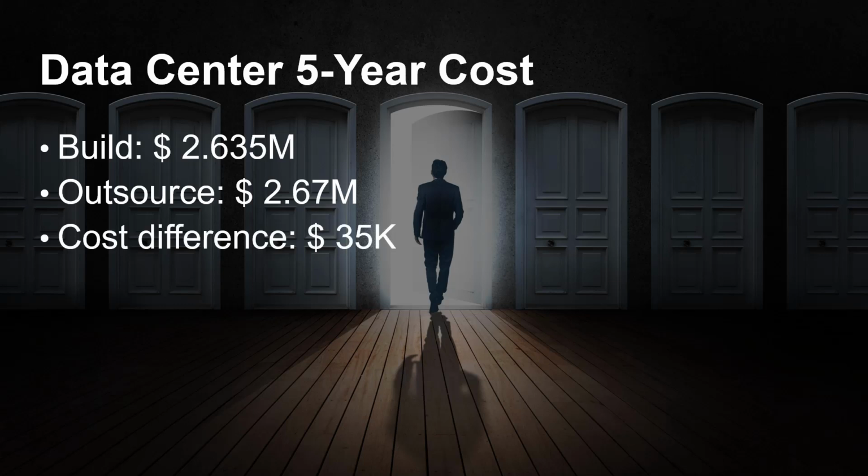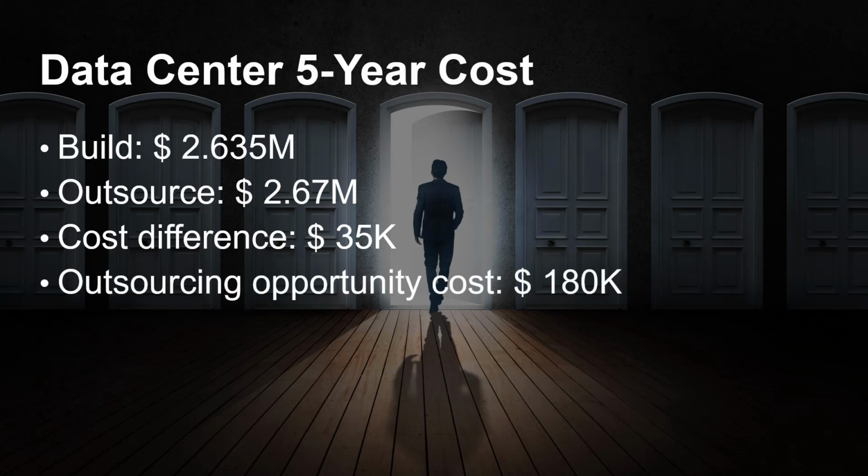However, in that calculation is the assumption that there would be $180,000 in profit resulting from impressing potential customers by building the data center. This would not happen if you outsourced the data center. So the opportunity cost of outsourcing here is $180,000. You always use the next best option for calculating your opportunity cost.